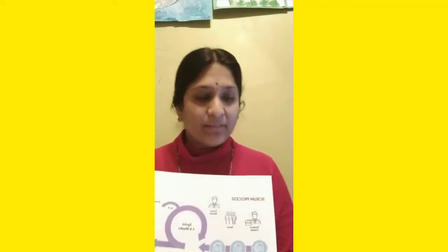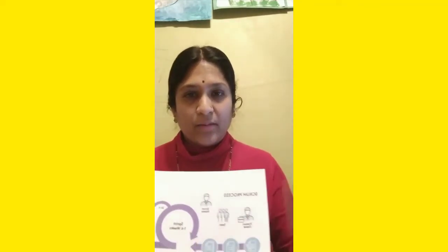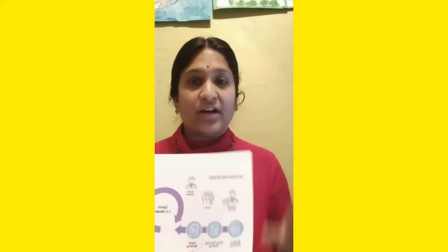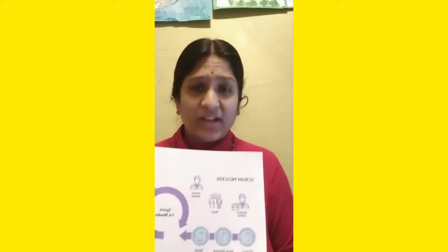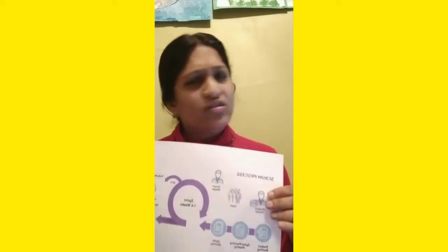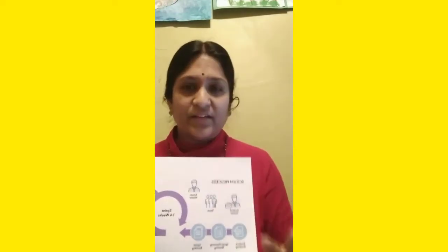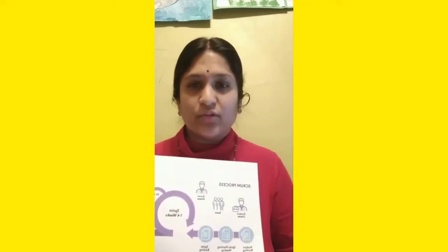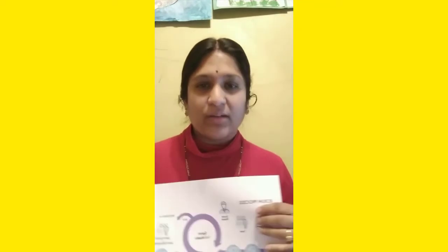And later comes the daily scrum. This daily scrum is a meeting where all the team together discuss every workday for 15 minutes. It is also known as a stand-up meeting, where they discuss three things, mainly what was done yesterday, what is to be done today, and what are the impediments or obstacles on the way to complete the work.